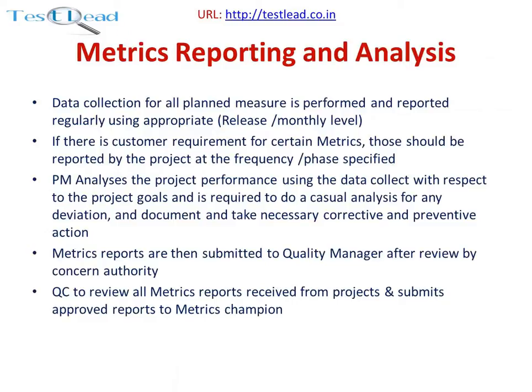What is metrics reporting and analysis? Data collection for all planned measures is performed and reported regularly using appropriate frequency — release-wise or monthly. If there is a customer requirement for certain metrics, those should be reported at the frequency or phase specified. The project manager analyzes project performance using the collected data with respect to project goals, performs causal analysis for any deviation, and documents and takes necessary corrective and preventive action. Metrics reports are submitted to the quality manager after review by the concerned authority.